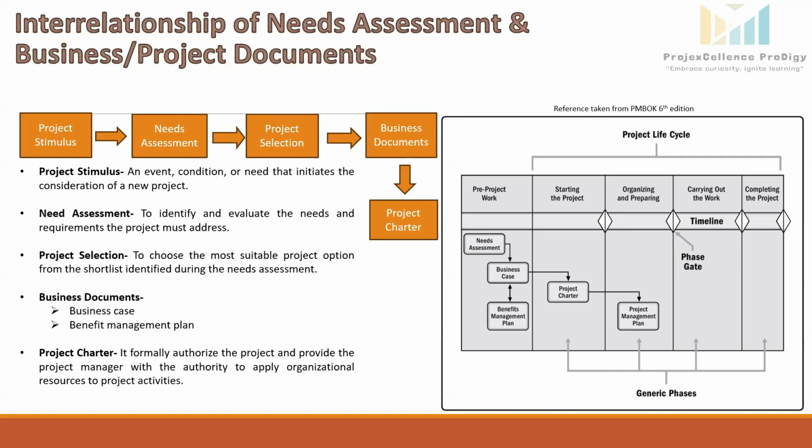The team will review local, state, and central regulations related to the setting up or running of the renewable energy project. They will assess the technical feasibility like site suitability, engineering, technology requirement, and financial feasibility like cost estimates and from where the company will get the fund for each and every option which they explore like solar, wind, and hydro turbine.